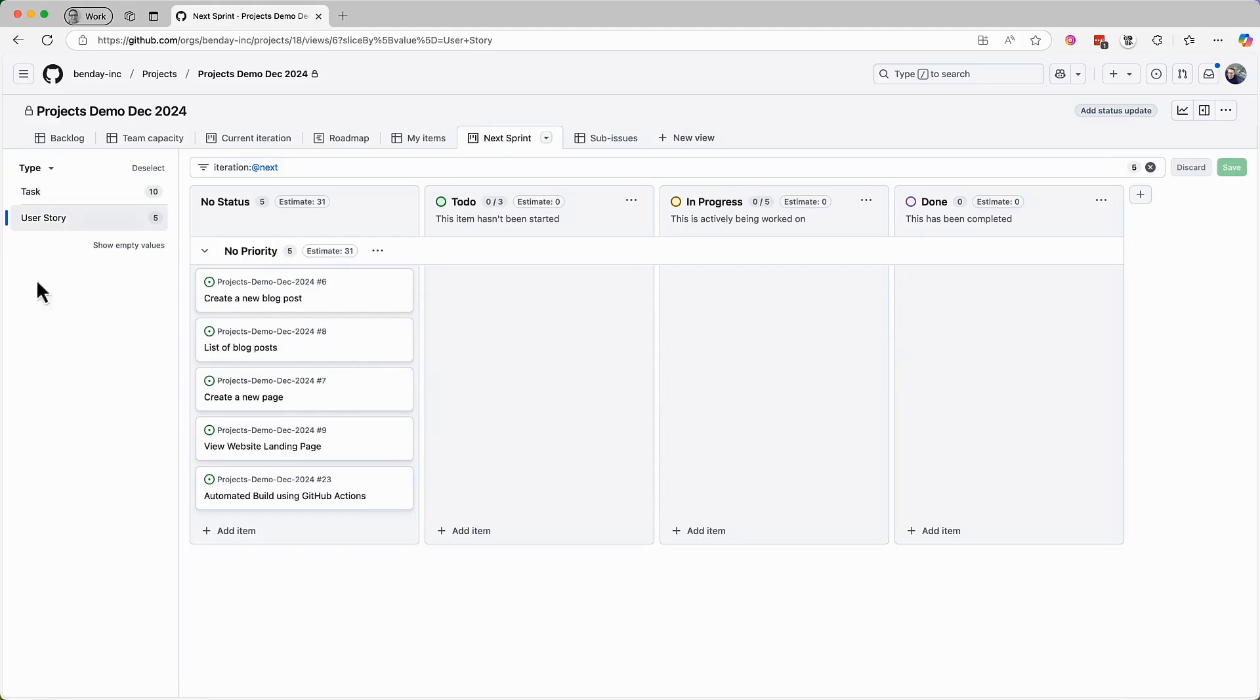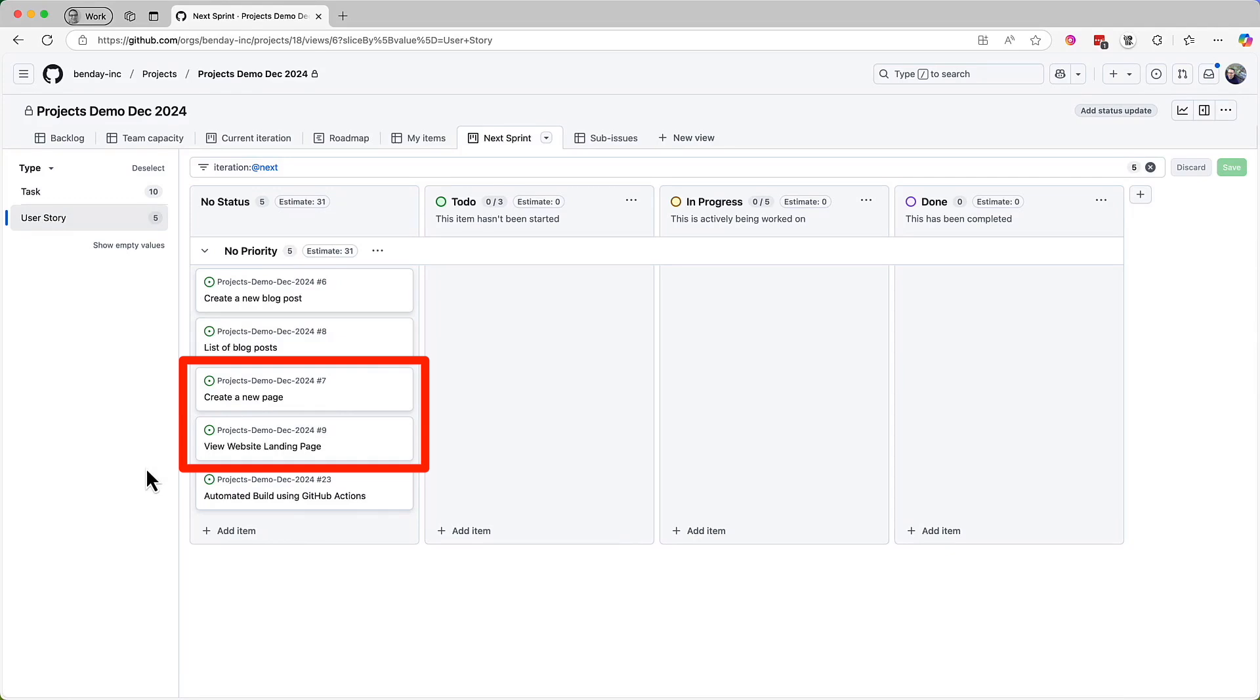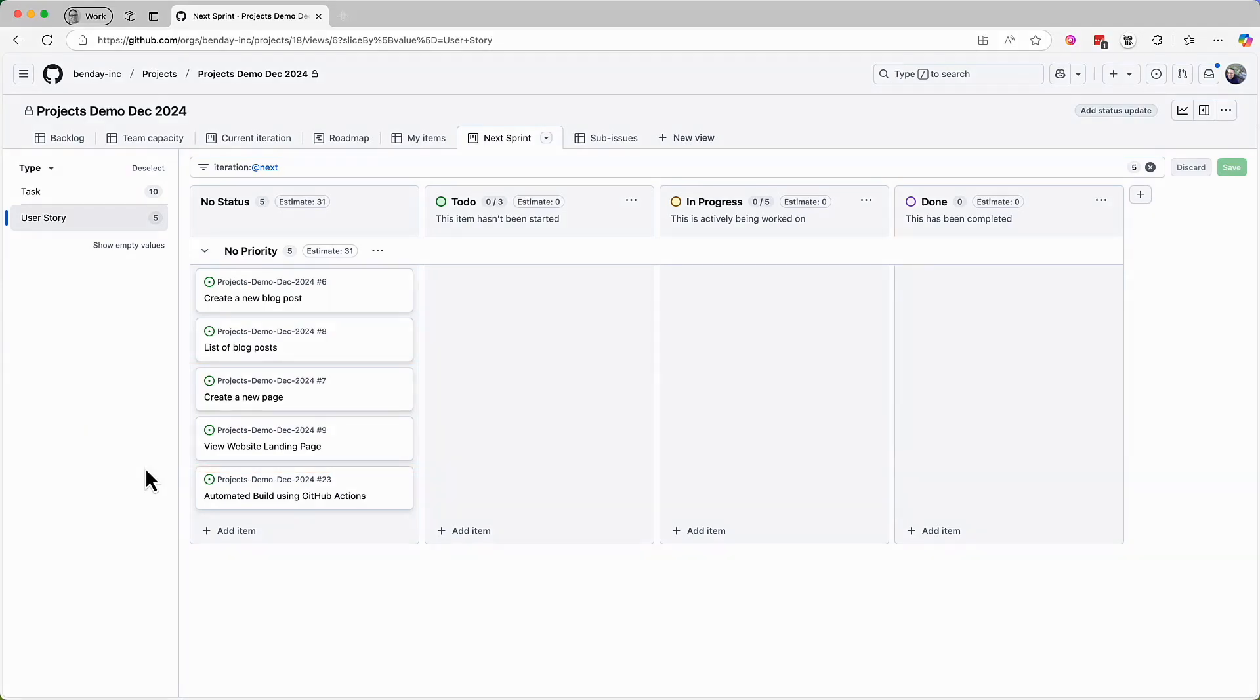So they flip the slice value on this view back to user story, so they can see all the PBIs that they've selected for the sprint. The team discusses this a bit and comes to the conclusion that these two requirements, these two PBIs, they don't have a chance of getting these done in this sprint. And the team's decision is to kick these items back to the product backlog. They're not saying we'll do it in sprint four or saying when they'll do it. They just are putting it back on the main product backlog.